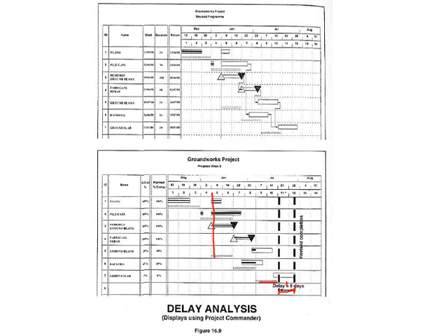Okay, and it had 10 days float. So that's where that 10 days fell away. Then the contractor was also culpable for an amount of 4 days. Okay, so that is how they got to the 8 days delay with 4 days of the contractor's responsibility.